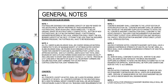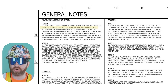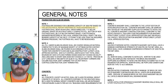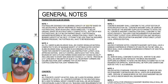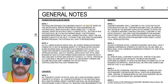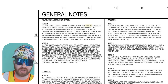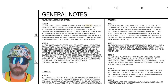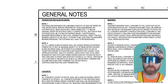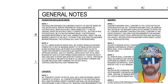Going full circle back to note one: the geotechnical report is a separate report compiled by a geotechnical engineer prior to the structural engineer finalizing the structural drawings. The report informs the structural engineer on design requirements based on how suitable the soil is to build on. The 3,000 PSF — pounds per square foot — is the measured strength the concrete will need to be, and later translates into a concrete mix design which the concrete contractor orders after receiving approved submittals.